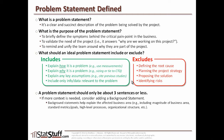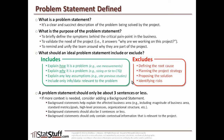Background statements, if you're going to create one, help explain the affected area — that business area where you're feeling the problem — and give some of that context you're looking for. Keep them very brief, only about three sentences or less, and they should only contain the context you want to use in order to explain the symptoms within the problem statement.